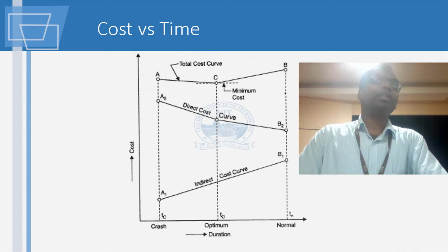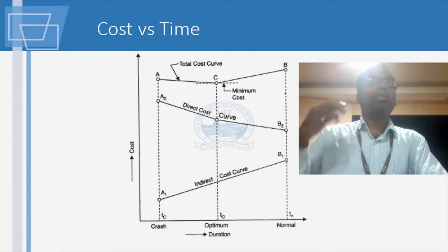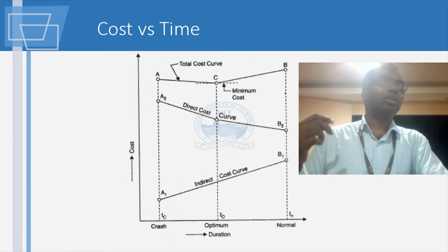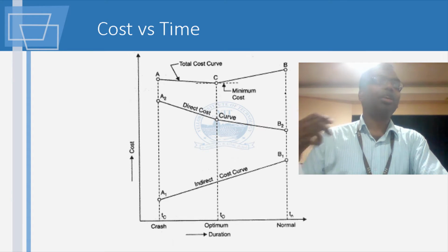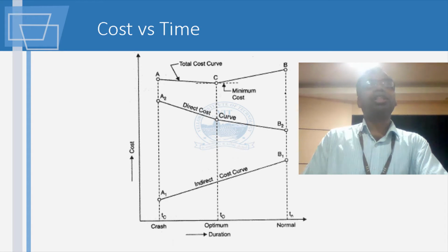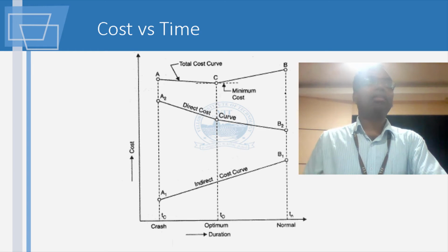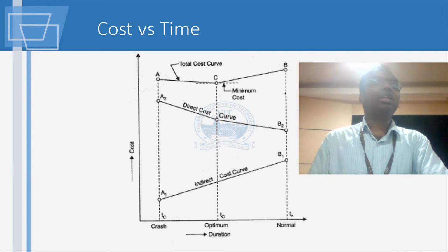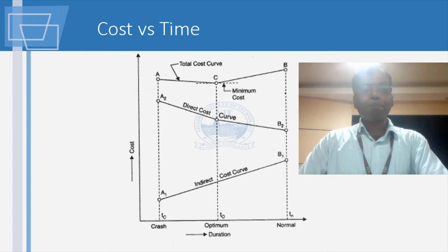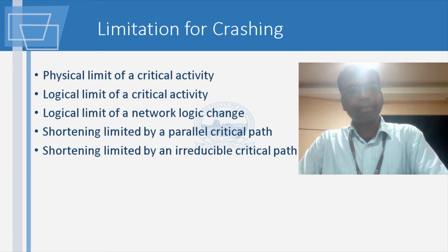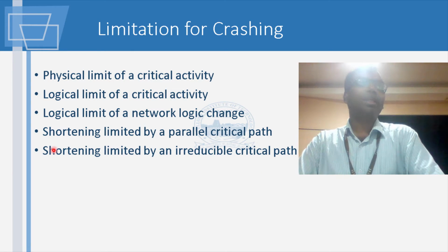So the last month of your project, for instance, what would have been the money which you would have been paying for the materials which you are buying, or for the cost which your laborers whom you are using, tools and plant which you are using, all this would have come down drastically. But your site office and all such establishments are having a cost which will be continuously added. Okay, so there is a limitation to which you can